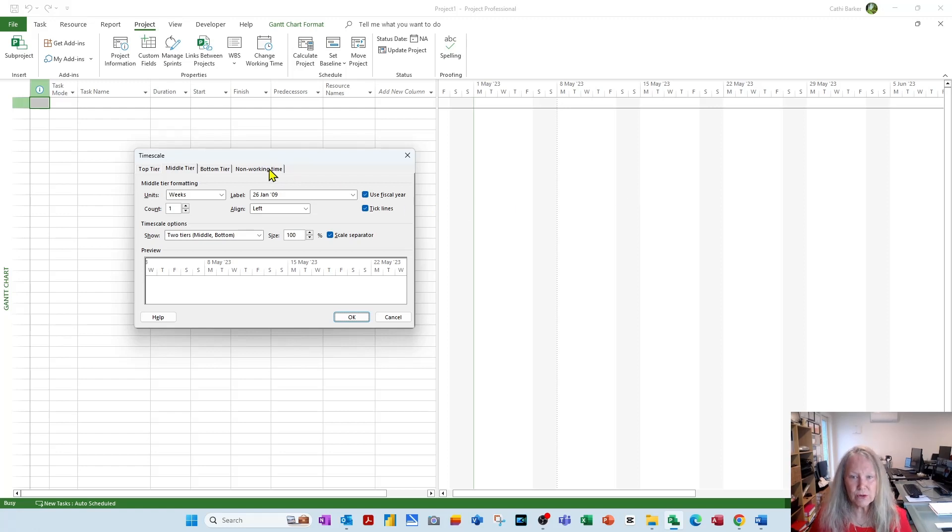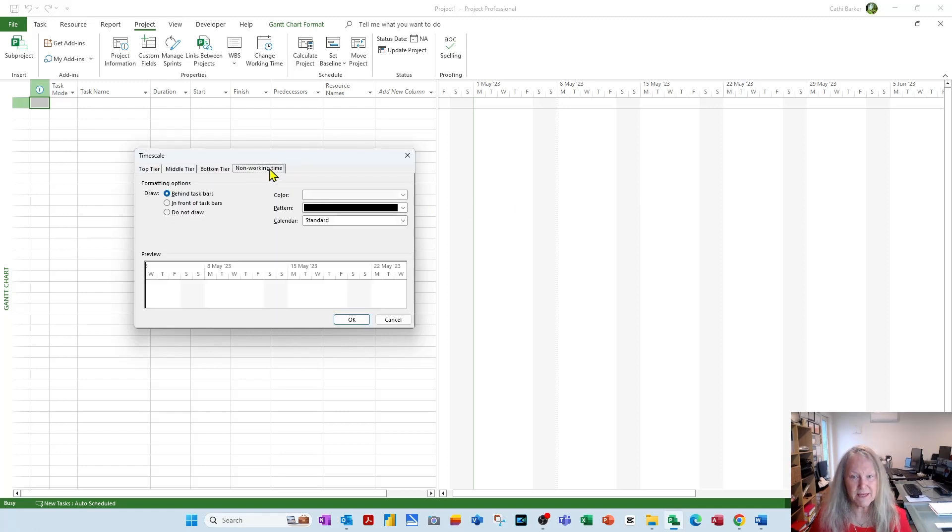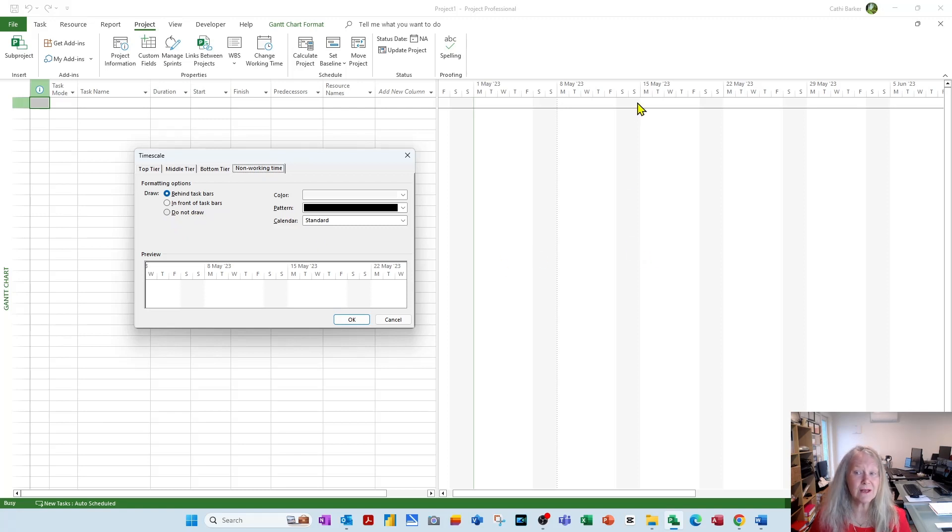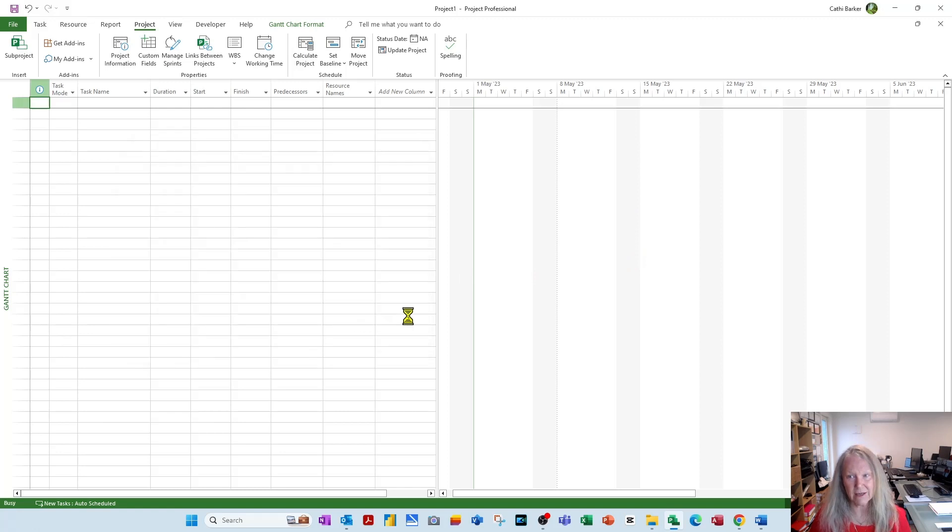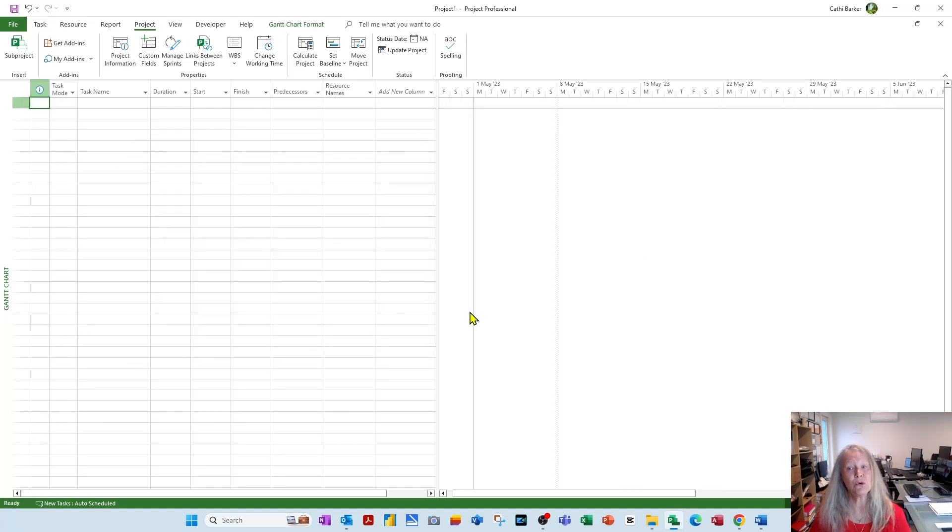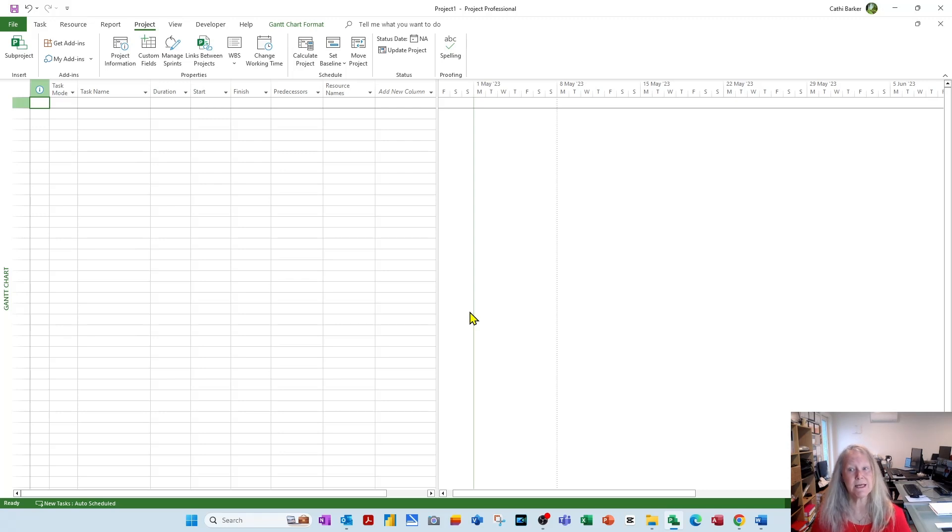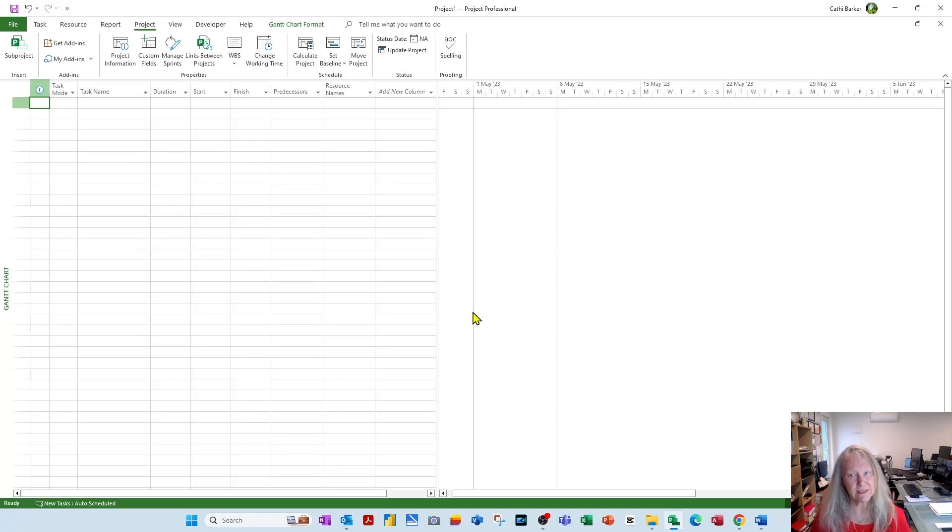So these non-working times are managed here. I would say do not draw them because they're a fallacy. That's rubbish. So do not draw and OK. And now you can see your Gantt shows that you are literally working Monday to Sunday, midnight to midnight, starting the coming Monday at 7am.